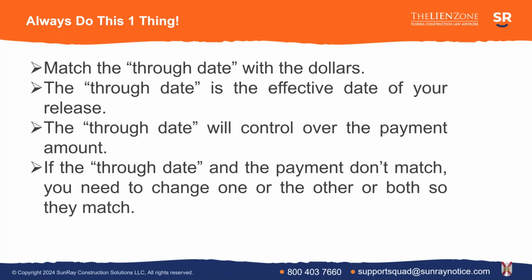Let me take a moment and at least explain the significance of $10. So let's go back to my example where you're showing up to pick up a $10,000 check and they only give you $6,000. If you are giving someone a check and you are getting a release, you want that release to say $10. And the reason you want it to say $10 is because legally speaking, $10, even if I'm handing you $6,000 or $10,000, a court just says, well, you got some value for this release. So the $10 is a placeholder for some value.